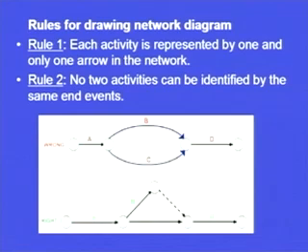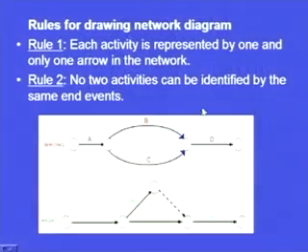That is the right network, which is shown here in green: activity A, B, C, D. Now, why was this type of network drawn? What could be the precedence relationship here? You can scratch your mind a bit. You will find that the precedence relationship says that activity D cannot start until activity B and activity C are completed.